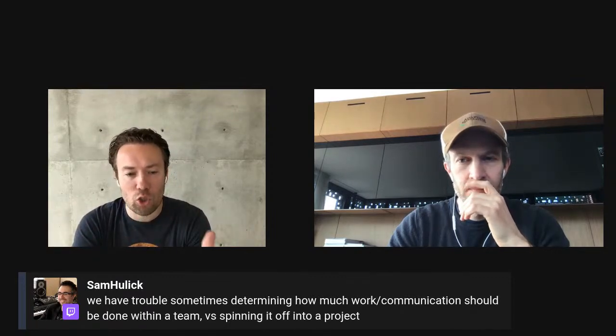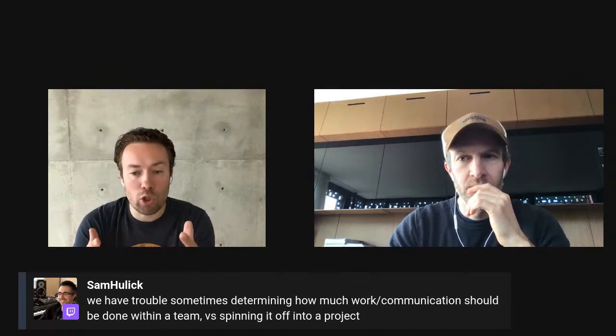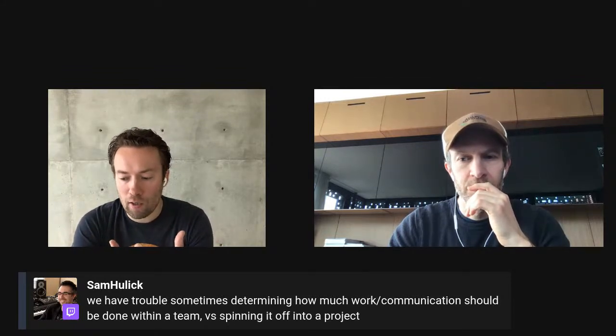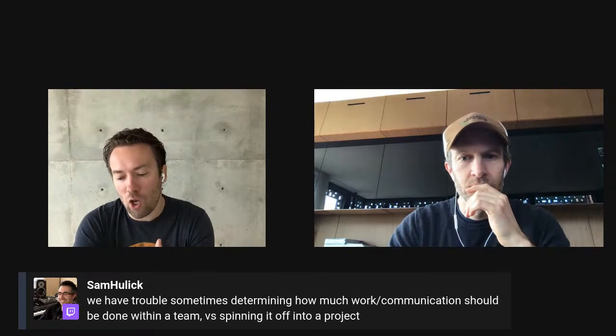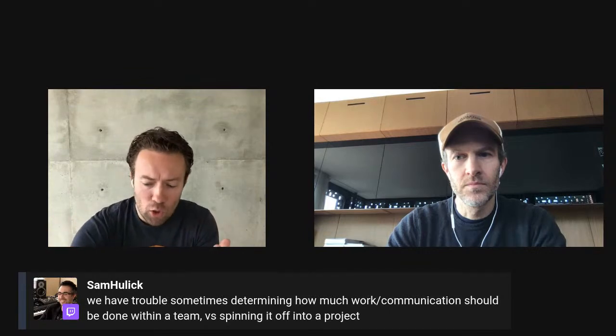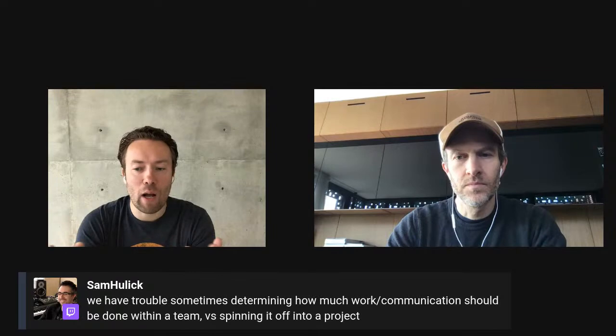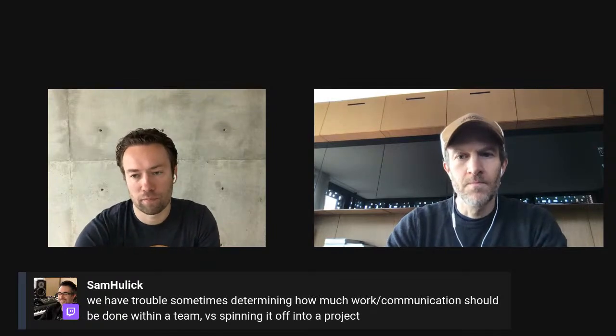So I think it's totally safe just to start it in a team. A lot of things probably should start in the team or in another general project, because you don't want a ton of half-empty projects. Projects are meaty things that have all the tools, so jump to those when you really feel like it's crowding the rest out.